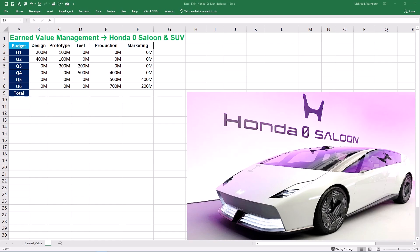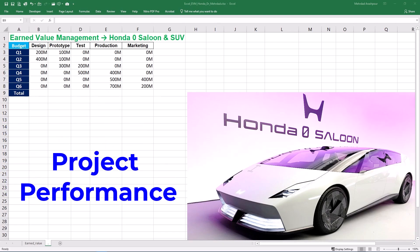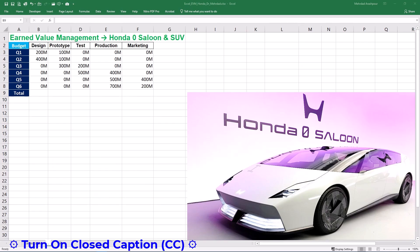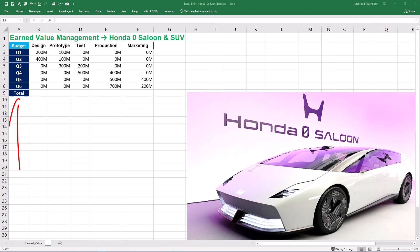Step 1 is finding planned value or PV, earned value or EV, and actual cost or AC. We'll use the Honda Zero Series project as our case study to measure project performance by comparing the planned work with the actual work completed. Honda Zero Series is an upcoming line of electric vehicles with two primary models: Salon and SUV. The project spans over six quarters and has five main activities: design, prototype, test, production, and marketing.